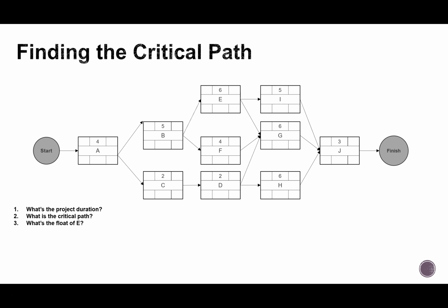So the first thing here to understand is that the critical path, by definition, is the minimum duration of a project, which is the longest path in the network diagram. So I really need to find the longest path to know my critical path, which will be my project duration. So that means that I would knock down question 1 and 2 all at once. So let's find that critical path, because that's really what the project duration is going to be.